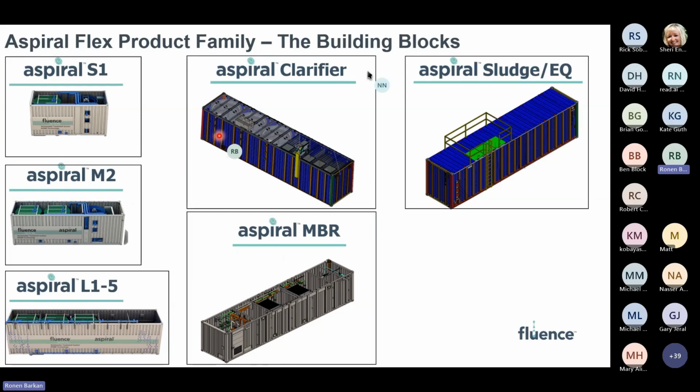So having a building block that, for a general contractor, is the same as a marine shipping container alleviates a lot of concerns of how do you move it from one place to another, how do you transport it, how do you ship it, how do you install it, how do you lift it. All of these things are very straightforward because a general contractor would address this just as a conventional shipping container that would have four locations to lift it, install it, and offload it wherever it needs.